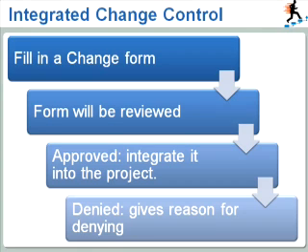For instance, a change in law may result in added project complexity and increased cost for the implementation, but your stakeholder may not be willing to pay for this additional cost, so therefore the decision is made to cancel the project. That is why every change must be fed into the integrated change control system.